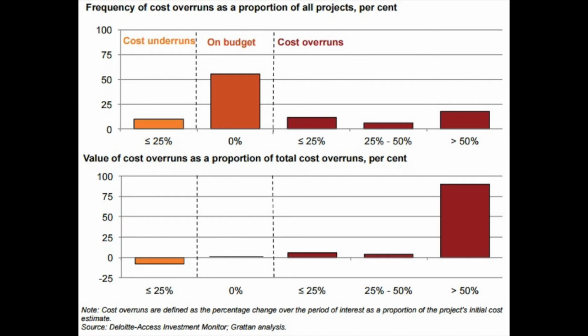For example, the Parramatta Light Rail blew out by $500 million due to mispricing and omissions from the business case. WestConnex, on the other hand, has crept up from $10 billion to $16.8 billion due to changes in scope, which comes back to poor project management. If the scope is incomplete, don't go to tender. The later something needs to be changed, the more expensive it gets, as per common contracting paradigms.